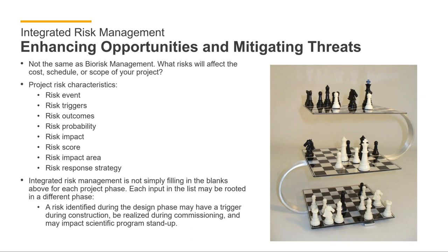And remember, some risks are positive. Those are opportunities. Some risks are negative. Those are threats. You want to maximize the amount of opportunities that your project encounters or sees, and you want to minimize the amount of threats that your project encounters. And each different type of risk has a different risk response strategy. Do you want to just accept the risk? Is it something that you cannot control? Can you mitigate the risk in the case of threats, or can you enhance risks in the case of opportunities? Now,